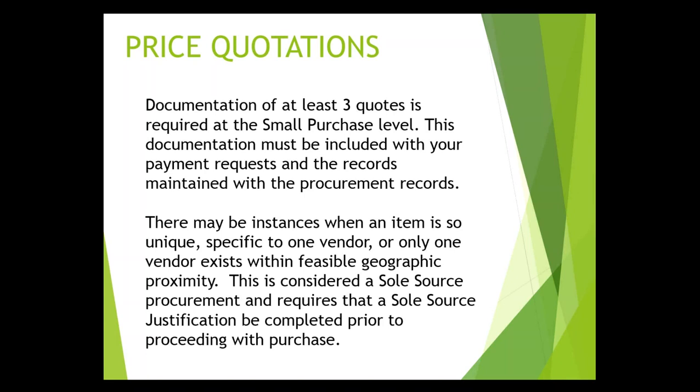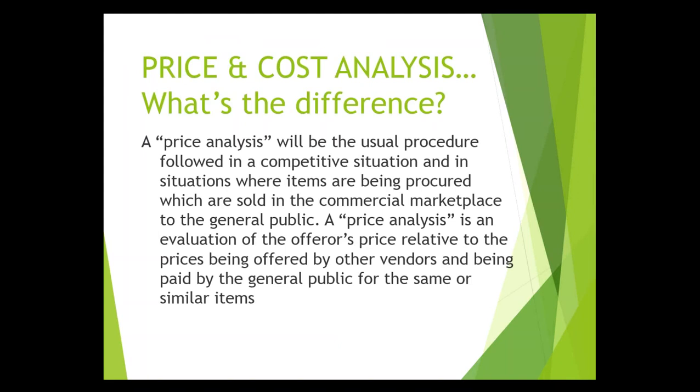Next, we're going to go on to price and cost analysis. This is an area where there can be some confusion. You're not going to be engaged in many procurements where these come up. Really, a price analysis is somewhat similar to the ICE that you do, and the product must be a commercial product, one for which there's a basis to compare to the commercial marketplace. And this would be suitable,